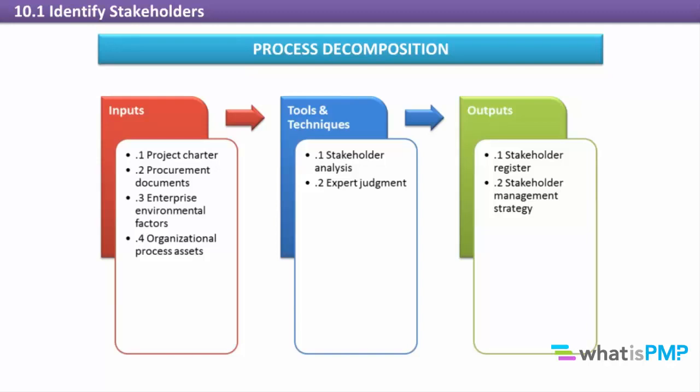The causes of stakeholder opposition are often rooted in the project objectives, the methods the project will use to achieve its objectives, the direct or indirect changes or transformations the project objectives will generate, the financial or human resource needs of the project, the people chosen or not chosen for the project or their roles, the vendors or suppliers chosen or not chosen for the project.